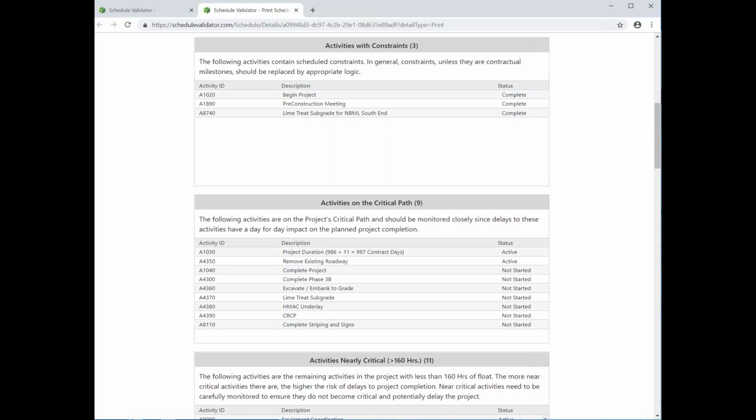How reliable is that critical path method technically, right? Sometimes if there's a whole lot of float, that could represent or identify issues with the logic, where maybe you're missing logic, and so that's why you have way too much float on some activities.